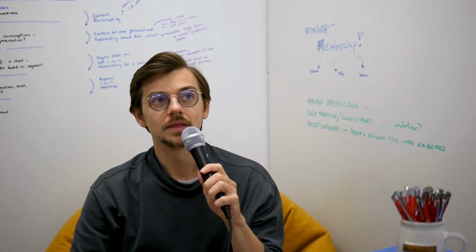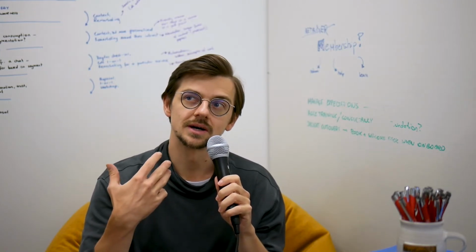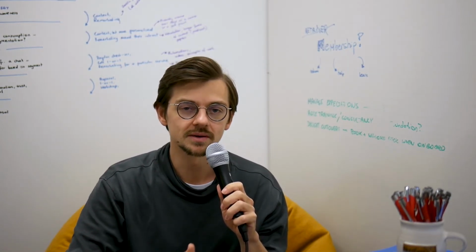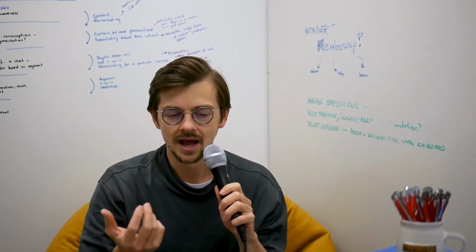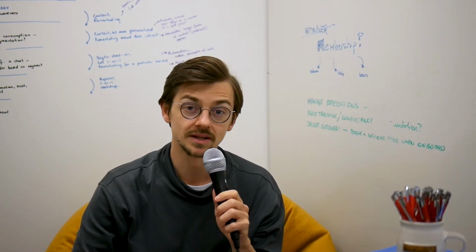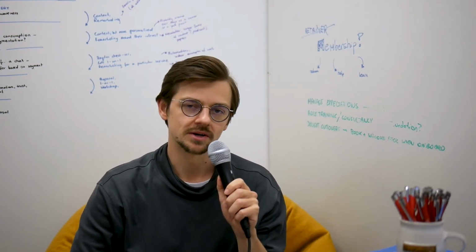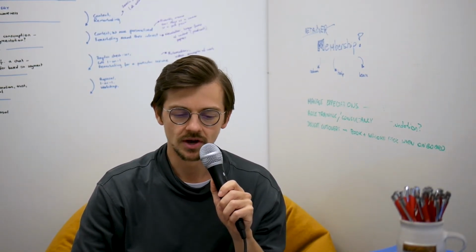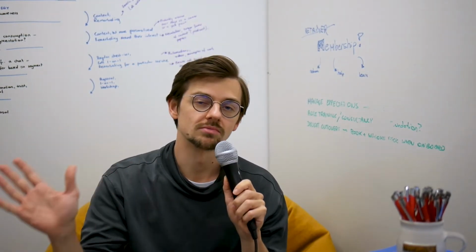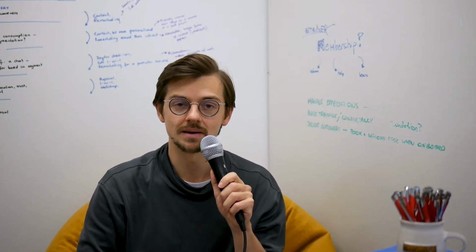Now, you might be asking, what about experts like legal advice or the CEO or whatever? These people, we consider them external. It's the Agile team's responsibility to keep them in the loop, meet with them to update on the progress, and absorb any executive decisions and then adapt. Remember the flexibility of it all, but they're not part of the Agile team, of the delivery team. They are just there to advise, keep them in the loop, and go separate ways. Okay, so that's it. That's really it. You just need about 5 people.